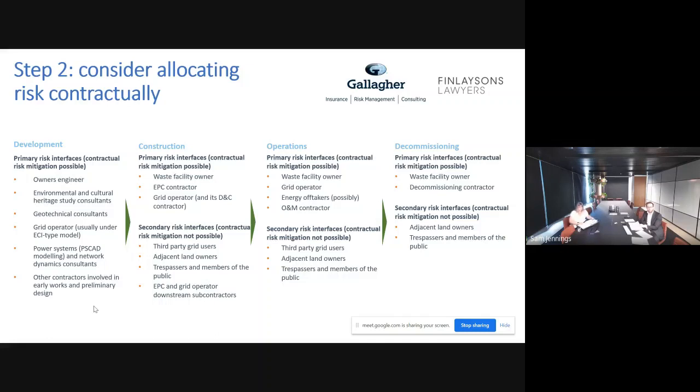And actually, just on that point, one of the major factors in the construction phase is, as principals to the project, it's really important that you take on a principal controlled project insurance policy to ensure that you've got protection for the financial consequences of a delay in startup, rather than relying on the contractor who can really only cover around 10% of your liquidated damages of the contract price. So it's really important that you control that whole process if at all possible, rather than rely on the contractors.